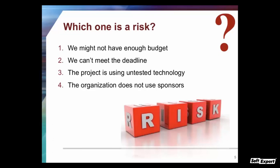Number one is a risk: 'we might not have enough budget.' Why? Because risks are items that may happen. We might not have enough budget — we don't know, but we might not. That's a risk. Numbers three and four — 'the project is using untested technology' and 'the organization does not use sponsors' — are written in present tense. They're statements. They might lead to risks, but they're not risks themselves. Risks always begin with something that might happen, could happen, or is probable.